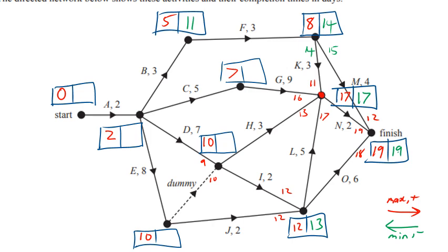So let's continue on the rest of the process. 17 minus 9 is 8. 17 minus 3 is 14. But 17 minus 5 is 12, and that's why we had a bit of another boo-boo down the bottom here. It's very easy to make these things. So that was 13. We choose the minimum, which is 12. That makes more sense. The green can never be more than the red. There's our 12. Now, this is what we spotted before because we had the two 10s coming through.